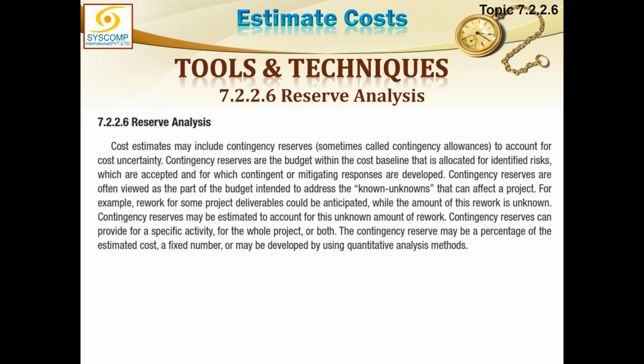But if I am buying a chair, how could it be 10% extra chair? So naturally, if the chair is so important that we cannot live without an alternative, and we need to have another chair, then it is 100% reserve, and we have to keep 100% more money for another chair if this activity is so important that we cannot miss out on having this chair.